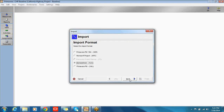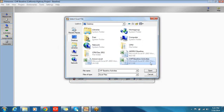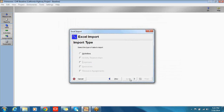I know it's on my desktop. Notice the file format — 1997 to 2003. Whenever you export from Primavera, and this is true for all versions of Primavera, it saves it as a slightly older version of Excel. We do not want to upgrade it. If you're ever asked to save it as a more current version while you're still in Excel, say no — Primavera cannot read them. I've selected it, click Open, Next. Of course, we only exported activities, so that's the only thing I can bring back in.